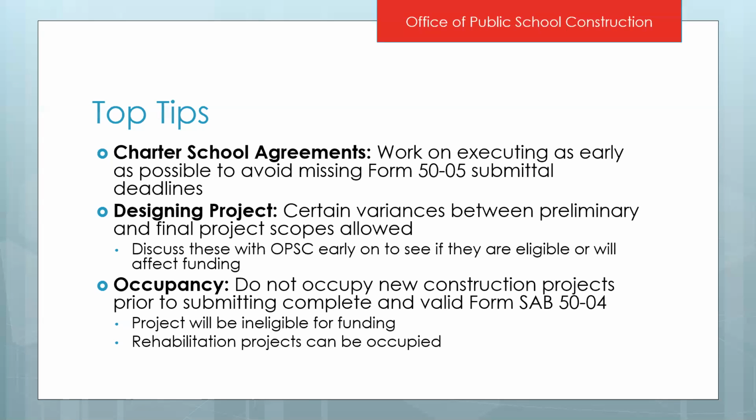So some important tips to leave you with. Those charter school agreements that you need to have executed in order to request your funding are going to need to be signed by the school district as well. So if the district holds title, they need to sign your MOU, and then you also need to get into a facility use agreement with them. Make sure you start working on them as soon as possible, because you don't only have your timeline to think about, but also your district's, and you don't want to miss that deadline to request your funds.